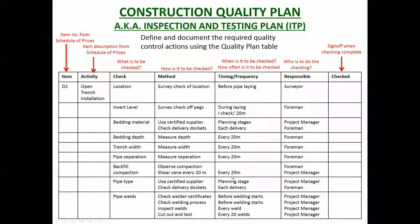Next is when you're going to do it — in this case, every 20 meters of pipeline for some checks, before laying the pipe for the location check, and checking welder certificates before welding starts. Then who's responsible. This becomes a to-do list for the project manager: check that we're using a certified supplier, carry out shear vane tests every 20 meters, check the welder certificates. These are the things to do as part of this work package to ensure we meet the project requirements.